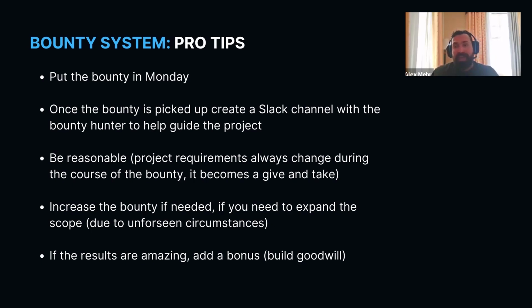Again, it comes back to being reasonable. Increase the bounty a little bit. And if the customer increases the scope, ask the customer to add a little bit to the project cost, okay? And pass part of it on to the engineer who now has to work harder. Again, you don't have to worry about their motivation and all that. They all want to work as hard as possible to get to the bounty, to get paid. So